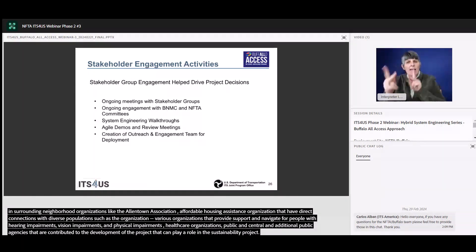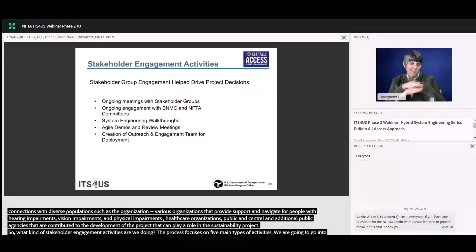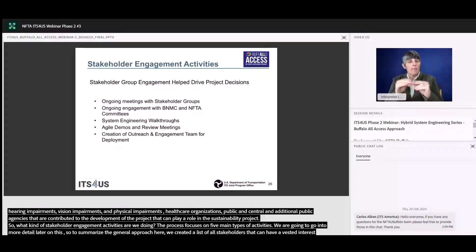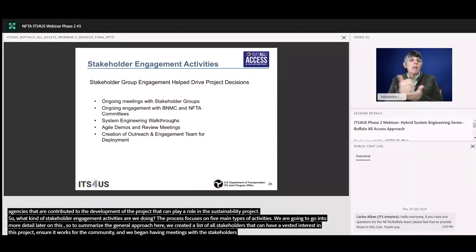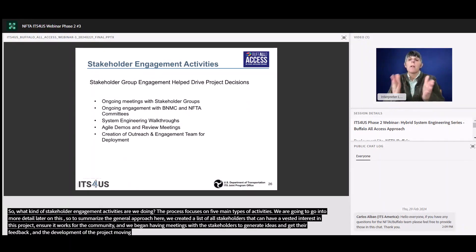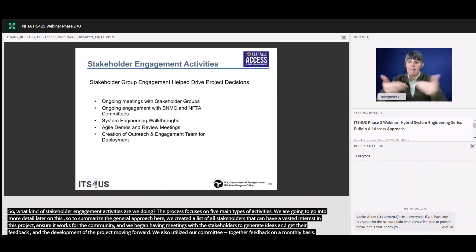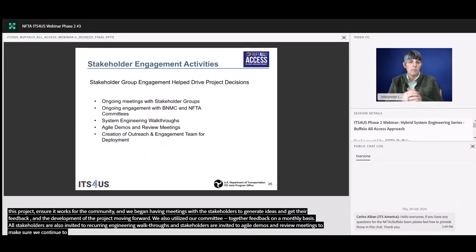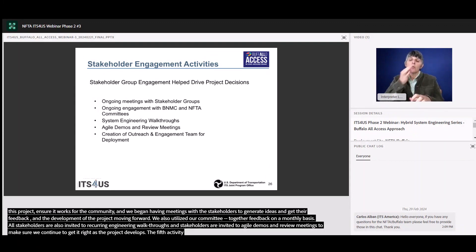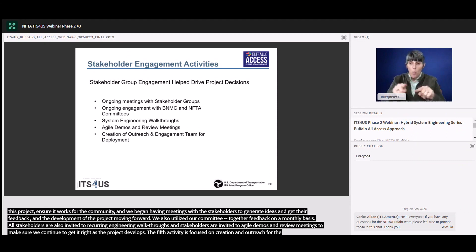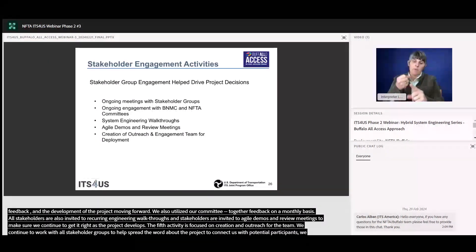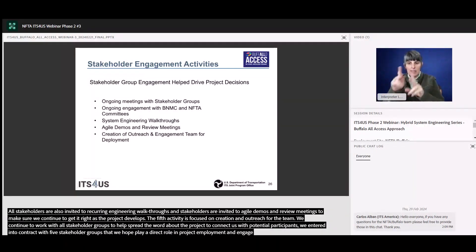What kind of stakeholder engagement activities are we doing? Our process focuses on five main types of activities. We created a list of all stakeholders that could have a vested interest in helping develop this project and began having meetings with these stakeholders to generate ideas and get their feedback as the concept evolved. We also utilized our committee meetings and committee members to gather feedback on a monthly basis. All stakeholders were invited to recurring systems engineering walkthroughs, and stakeholders were invited to ongoing agile demos and review meetings to make sure that we are continuing to get it right as the project develops. The fifth activity focused on community engagement is related to upcoming deployments and the project's outreach and recruitment needs. We recently entered into contracts with five stakeholder groups that will be playing a direct role in project deployment and in helping engage and recruit potential project participants within the communities that the stakeholder groups directly serve.